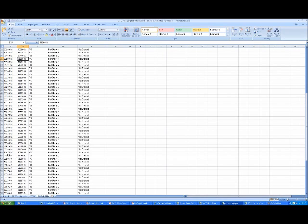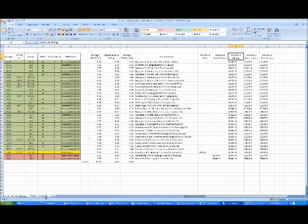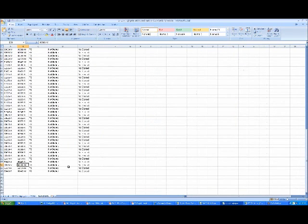And then adjustments have a finish start relationship with a resurfacing activity ID for that same street segment. And down below, video, which is a water management activity in the work breakdown structure, has a finish start relationship prior to milling for the facility ID associated with it. So this looks like a lot of data, but it's not that much to build it just by copying and pasting values from this sheet to the other sheet. So it really goes quite easy.